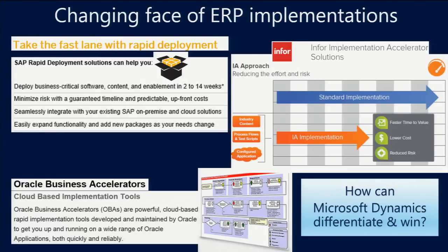So the more we can do to get value early on in the process, the better off that we're going to be in terms of getting that early on success. And the important thing is to build on that success. Because once you're out there, you've got some things moving, you can actually build momentum. So these long-running 2, 3, 4-year projects, we're seeing far fewer of those in general. And the reason, again, is because of the changes. In fact, we see requirements gathered 3 years ago that don't match up to the business needs of today. So it's important that we're looking at techniques where we can start to figure out methods and approaches that we can start to derive value from the solution much earlier than we've seen before.